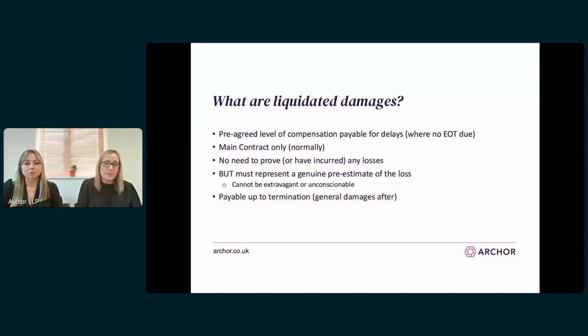There was a lot of historic case law covering what was a genuine pre-estimate of loss and whether LDs might constitute penalty clauses. But the more recent approach by the courts has been somewhat more relaxed, so that now the position is that as long as an employer can prove the level of liquidated damages is not extravagant or unconscionable, the liquidated damages will be recoverable.